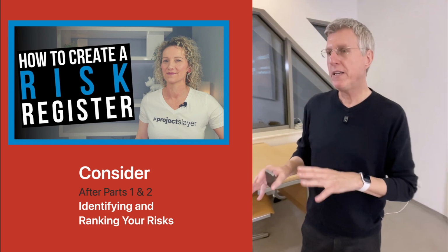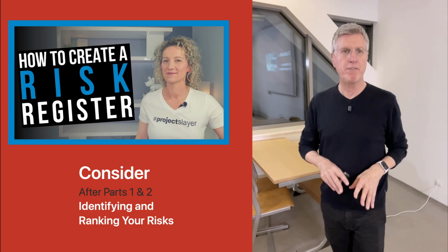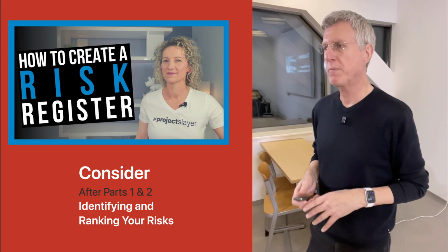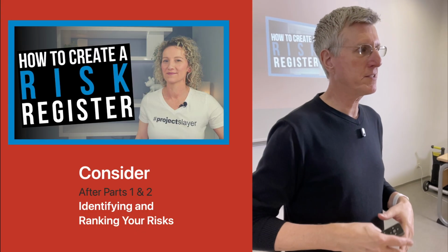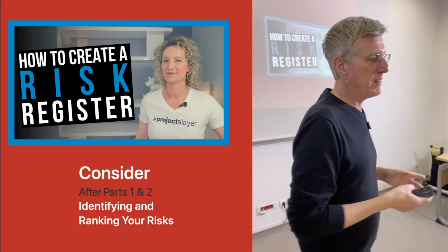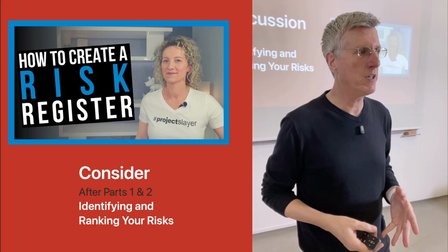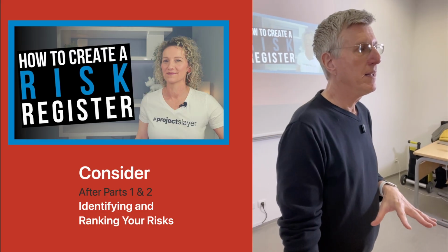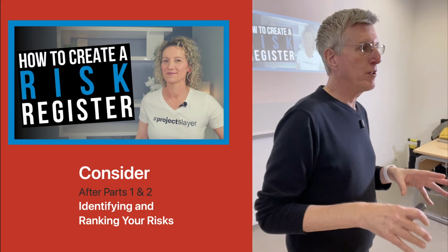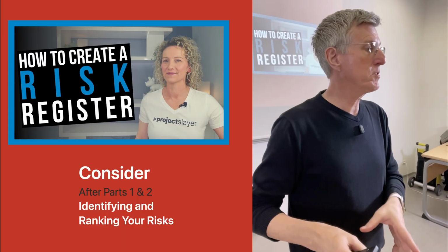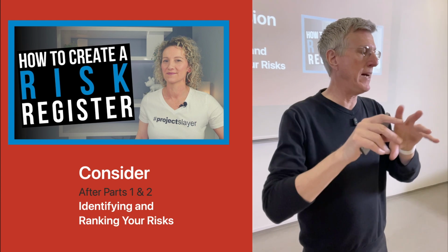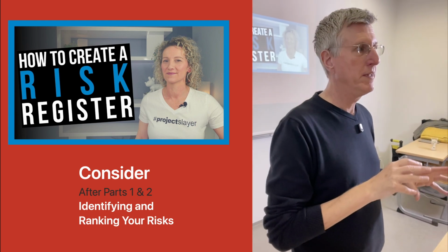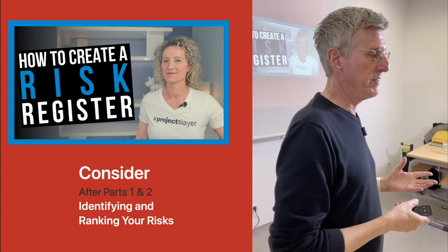And how many should you identify for your project plan? As many as we can? Yeah, you're absolutely right. It's something that should be an ongoing process. We're never really done with that because new risks are emerging all the time. I would recommend, though, that you focus on the most impactful risks. If you start getting too many and that matrix starts getting too full, it might lose some of its effectiveness.